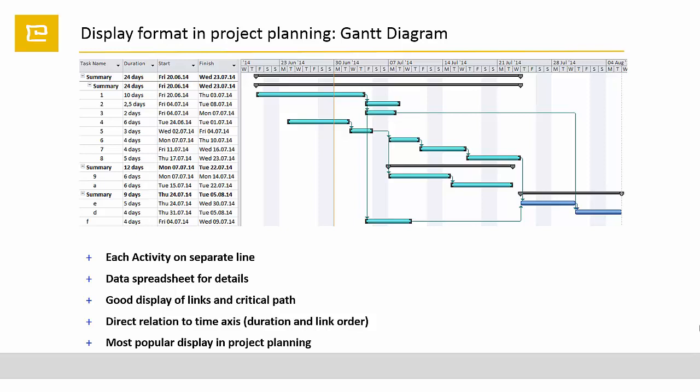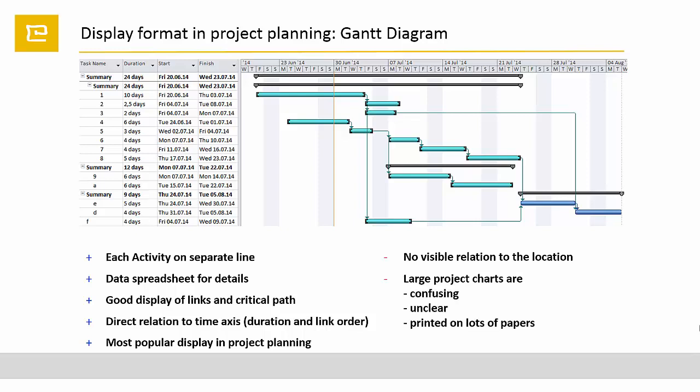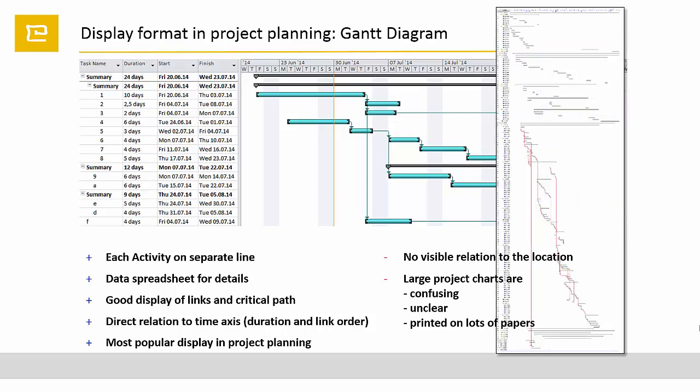But especially for construction projects, there are some limitations that complicate the readability and understandability of a Gantt diagram. There is no visible relation to the location or building to be constructed. Especially large project charts therefore are confusing, unclear, or must be printed on lots of papers.